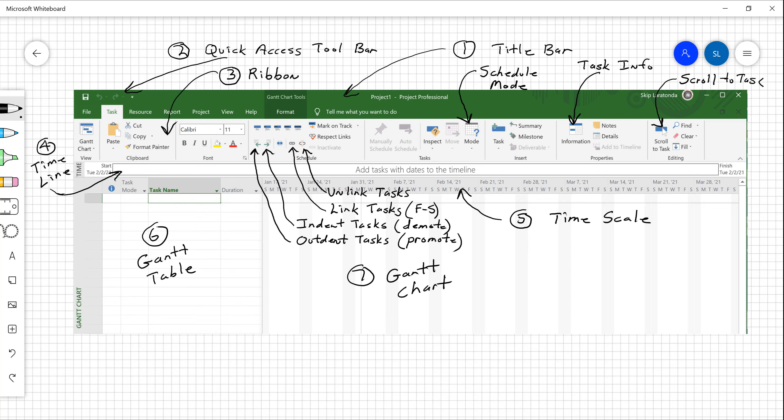When you launch Microsoft Project, make sure you start it in automatic mode before you even start typing tasks or putting in durations, because it's not retroactive. Make sure the mode is auto-scheduled. If you don't do that, you take all the dynamic features out of the product. Once you get more experienced, you may want to look at manual mode, but until you understand how it works, keep that mode on automatic.